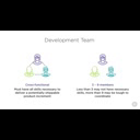And while we're on the subject of the development team, I'd also like to call out that your team size is also very intentional. The Scrum framework specifies a team size of 3 to 9 members. This is because teams smaller than 3 usually do not possess all the skills necessary to complete the product increment independently. And teams larger than 9 often find that the work and the communication across the team usually becomes too difficult to coordinate. On your development team, there are 3 cross-functional team members, which, while it's on the small side, is a great place to start for an organization who's first dipping their toes into the Scrum framework.